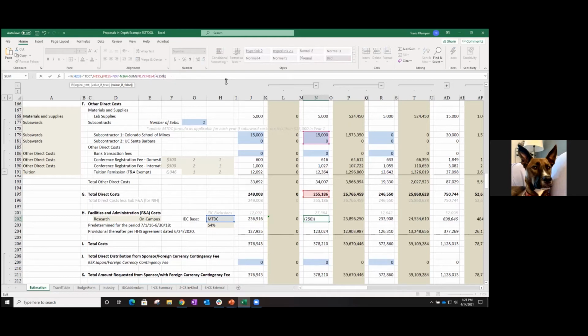So we account for that 25,000 again, minus this cell again. And I'll show you why we're going to the cell as opposed to just directly entering that value. All right, and it'll adjust the formula if it's missing a parenthesis. So the reason we recommend doing this by referencing back immediately to that cell is, let's say the sub comes back, figuring out what the actual costs are. It'll account for that as well.